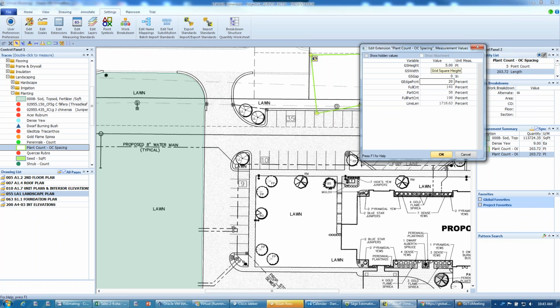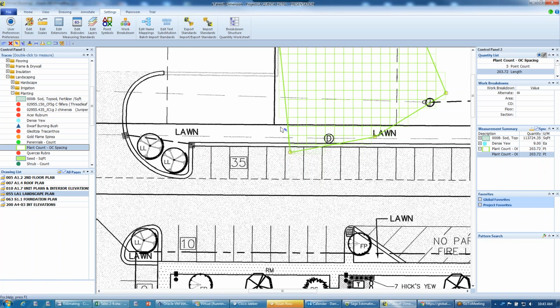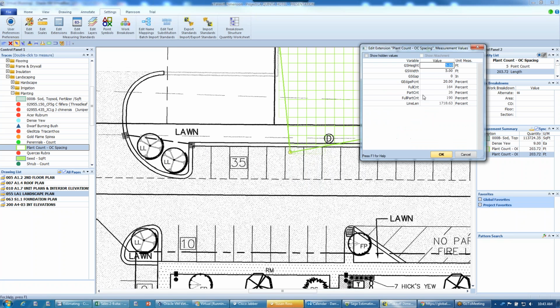But when we say 20%, what that means is when I go to this takeoff here, you guys are going to see these squares. And it's what percent of those squares do we want to start counting as a plant? Right, so based upon that spacing, it's going to roll into beyond what our square footage was for that. So in the end, you put in that percentage right there, and then it will say, well, we've got 190 count here. 26 of those are sitting outside of that percentage. If I make a change to that, then it will up that 190 to whatever that number may be. So if I said 75, and I'll bet you that'll count all of them, then it's going to be 180 plants for that. All of that is extractable and you can send that over into the estimating as well.